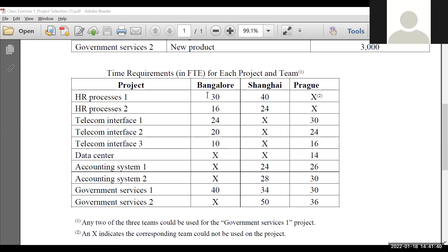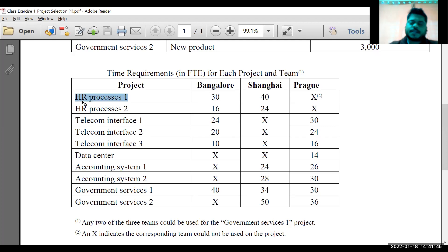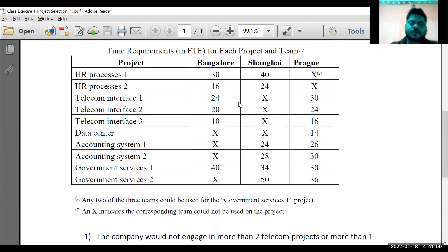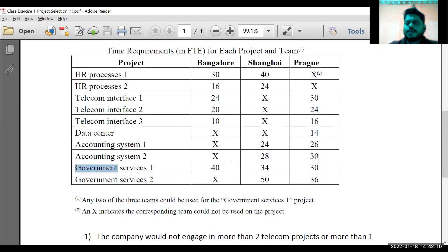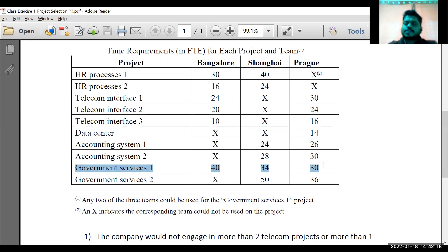I have different FTE requirements for each of the projects — HR, telecom, and all those projects each have different full-time employee requirements. I think only one or two groups did it correctly. Most of you forgot: it was mentioned that any two of the three teams could be used for the comment services project, because this is the only project where all three teams were given a number.